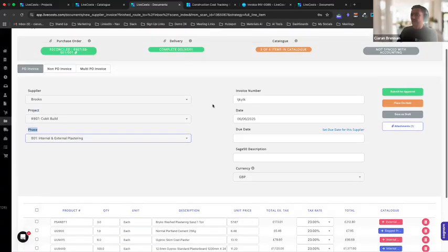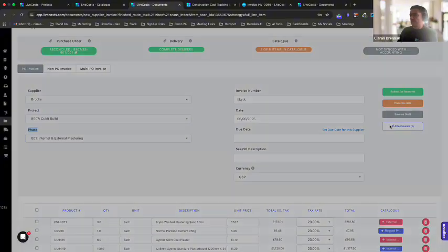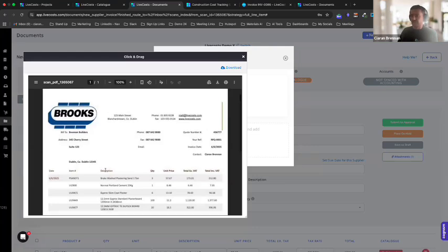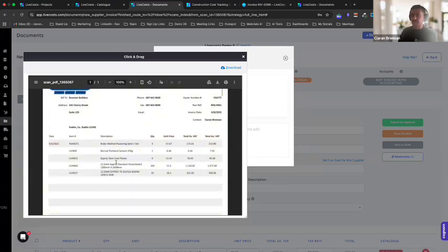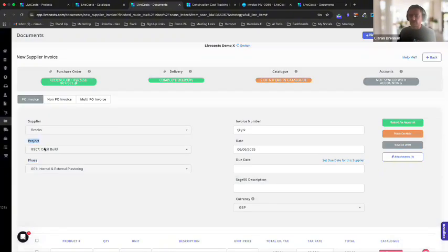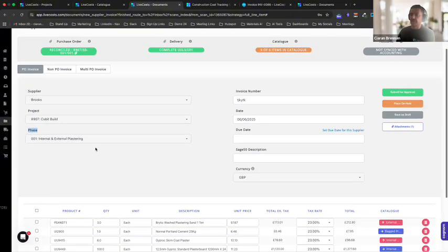Okay. Final step to this is I'm happy with this. So I basically dropped this invoice in, and AI has gone and fetched the PO for me. It's told me whether it's been delivered. It's analyzed all these items, told me whether these prices are on point, whether they're good or not. It's given me the data to collect for future reference. It's job costing this invoice against the correct project and back to the estimate where the PO got generated from.